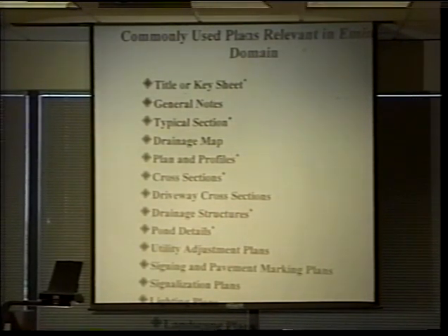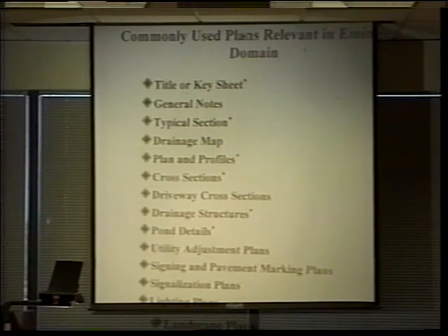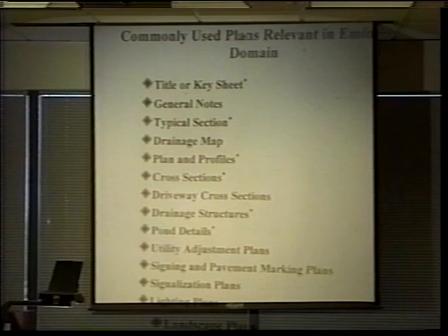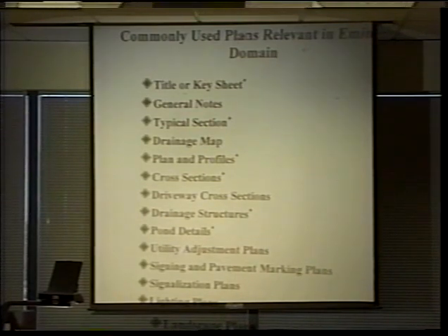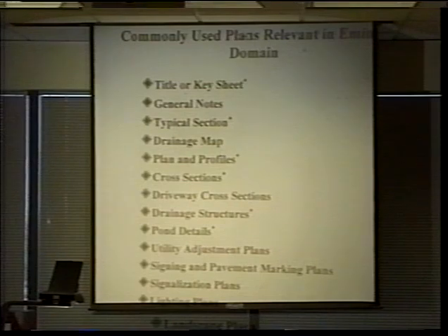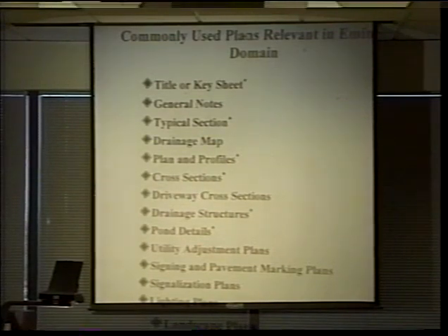And that's an important element in the eminent domain process, since it's a process that can take 3, 4, 5 years. Original acquisition may start with a set of construction plans that are 30 or 60% complete. Since the design information is not complete, you can't make complete evaluations of what the impacts are. You want to come back and visit this same set of plans at a 100% status of completion to make the final assessment.